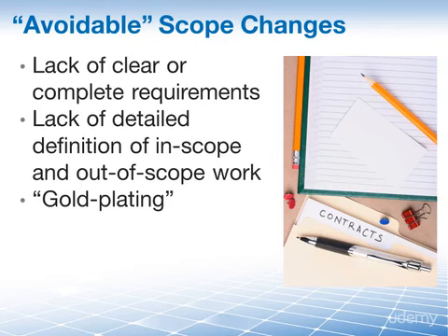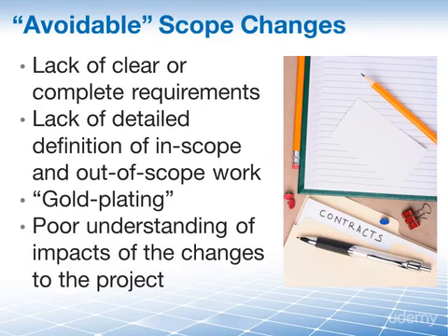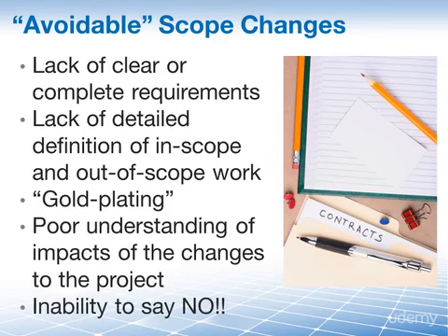And then there is a lack of fundamental understanding of the impact of proposed changes to the project. Oh, it's just a small change, but the rippling, the domino, the snowball effect is not understood because there may be a downstream effect that you simply haven't considered in your analysis. And finally, simply the inability of the project manager or sponsor to push back and just say no. Remember, project management is not a popularity contest. It's the most difficult yet most important word to use.